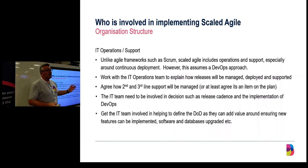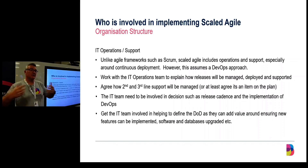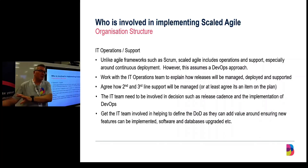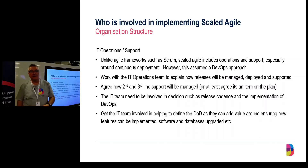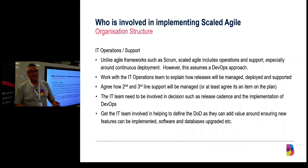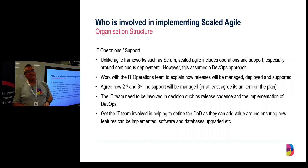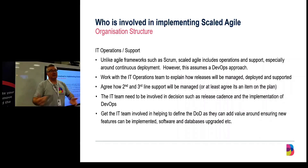Unlike scrum, which is arguably just the development side, scaled agile is the whole organization — so you've got to worry about IT support. It's great if you've got a DevOps team with a wonderful build pipeline, continuous integration, continuous delivery. If you haven't got that, you need to look at how to build it. You also need to worry about support: who does second-line support? Are you going to have separate scrum support teams, or bring tickets into individual teams? If you do the latter, that's going to impact velocity. Think about these things up front.